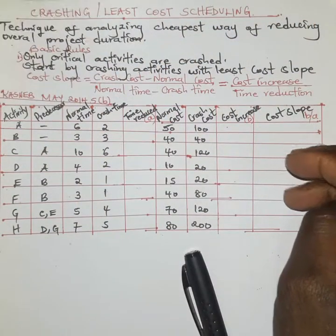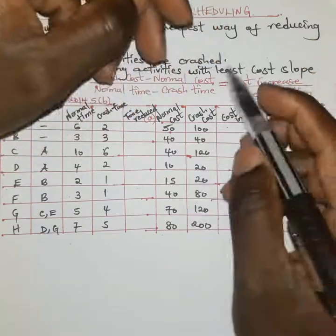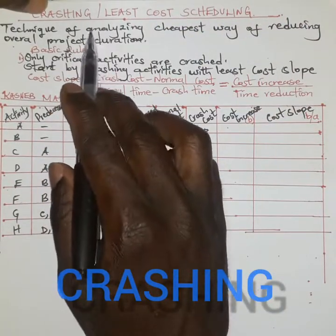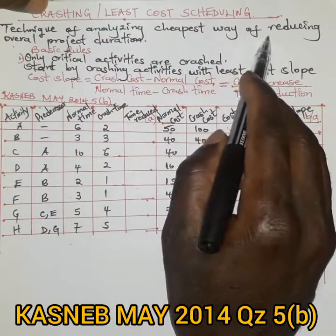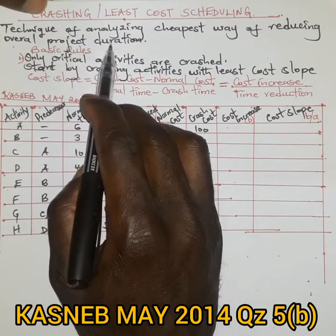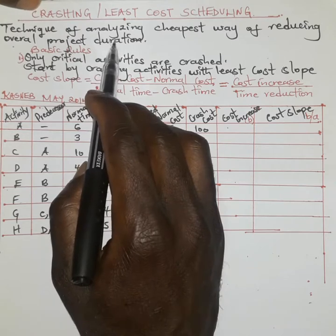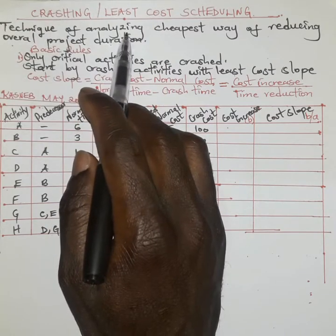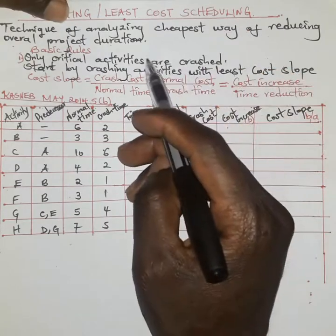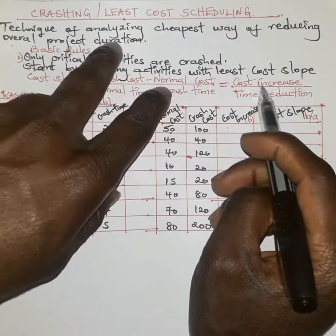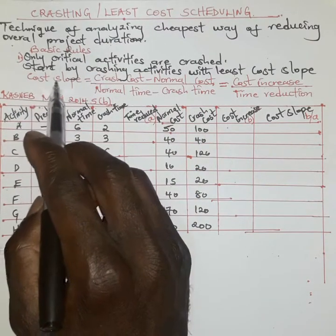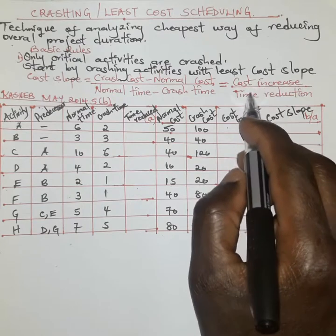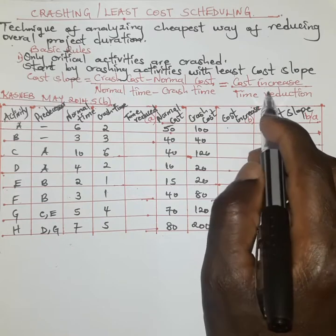Let's do something on network analysis — specifically crashing. Crashing is a tool for analyzing the cheapest way of reducing the overall project duration. In any project, reducing the project duration will incur an incremental cost. When we talk about this incremental cost, we talk about the cost slope, which measures how much the cost increases per unit time reduced.